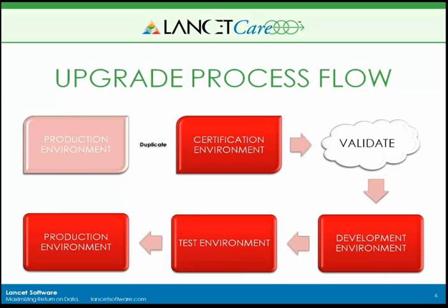An alternative method to an upgrade that we've done is to, again, validate in certification, make sure we have a solid validation, we're comfortable with the upgrade in there, and then actually do the upgrade in production first. What's nice there is now production is at version 9, and test and dev are at older versions. You can still migrate objects up in an emergency situation through dev, test, prod, because you can migrate from an older version of MicroStrategy to a newer version. And then after the production upgrade, you have a little bit more time where you can take your time to upgrade the test and development environments. So, two different process flows that we've had success with.